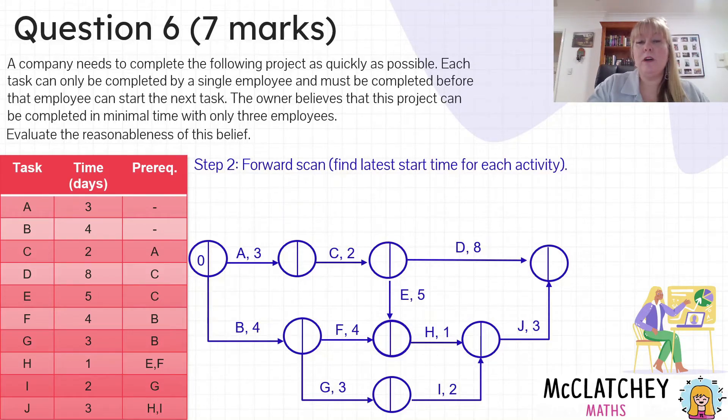We're going to start with our very first vertex which is our open one that everything flows out of, and it's always going to be a zero because everything starts at time zero. Then I'm going to move along different pathways and add the activity time to the previous vertex's information. Activity B takes four days, so zero plus four gives me four. Then I'm going to move along to G. G is going to be four plus three gives me seven days. Activity A is zero plus three gives me three. Move along with activity C, three plus two gives me five.